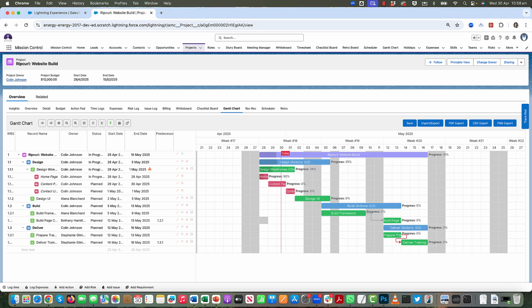You'll notice the bars on the timeline are a little more rounded than they used to be. There are some slight changes, like these used to be plus and minus signs, they're just arrows now. And the other key thing is the color of the dependency links. Previously, a dependency that was not part of the critical path would be orange. You can see now that it's grey, and they're just a bit more curved. The dependencies that are part of the critical path continue to be red, as you can see here.